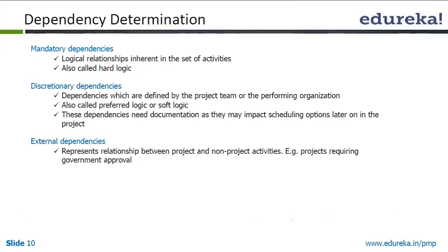We know that we will put the carpet and then we will put the furniture. So what we do is we put 3 more days after the laying of the carpet before starting to put the furniture.